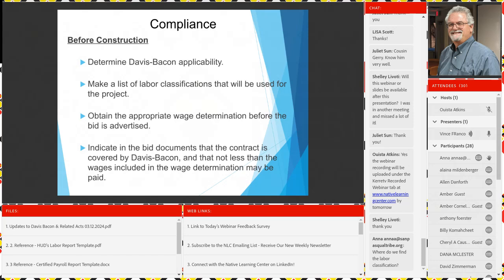So you have leverage. You know what you're talking about when you finally select a general contractor and you say, or put it out in your bid, that it's going to be prevailing wage. And then when they come in for the sealed bid opening, if that still applies to tribes, a sealed bid opening to the public, they're talking about eliminating that in the uniform guidance regulations. But anyway, when it comes time to open up those bids, then you can say we have a pretty good understanding of where these rates are going to be for the trades, because we've already done our research with Wage and Hour Division. We know a carpenter is going to make $21.87 per hour plus 33% for a base rate, plus time and a half if you work them on weekends, double time for holidays. You can do the math. You can have an idea what you're talking about and look like you know what Davis-Bacon is all about.